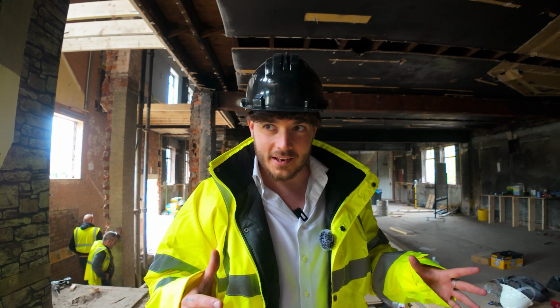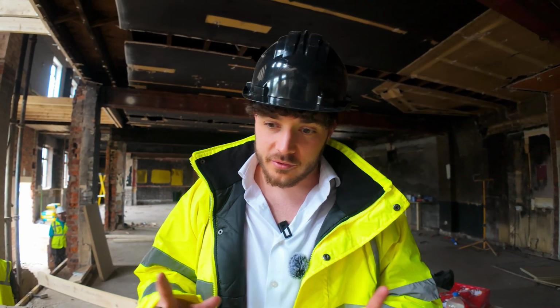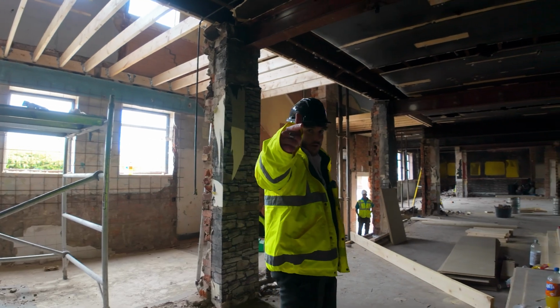So we're just waiting to get that design together properly before we can start slinging up all of our stud work. But before that, we will need to channel out all of our drainage. Yeah, we're making good site progress. Happy days. A little bit slower on the strip out than we'd like, but that's mostly because of the asbestos. So see you somewhere next.